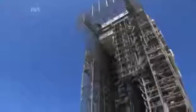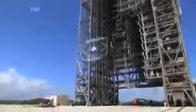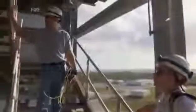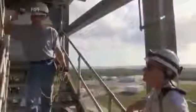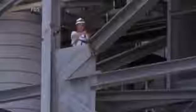Stacy and Ray need to load the 11th and 7th levels. But with much of the flooring removed, access is proving a challenge. The whole three row, you gotta tie off and you gotta walk the steel. There's no way to get to it. With the catwalks and access corridors gone, Stacy's forced to the edge of the tower's infrastructure. It's slow work. There are now only 2 days left until demolition and hundreds of shaped charges still to be loaded.